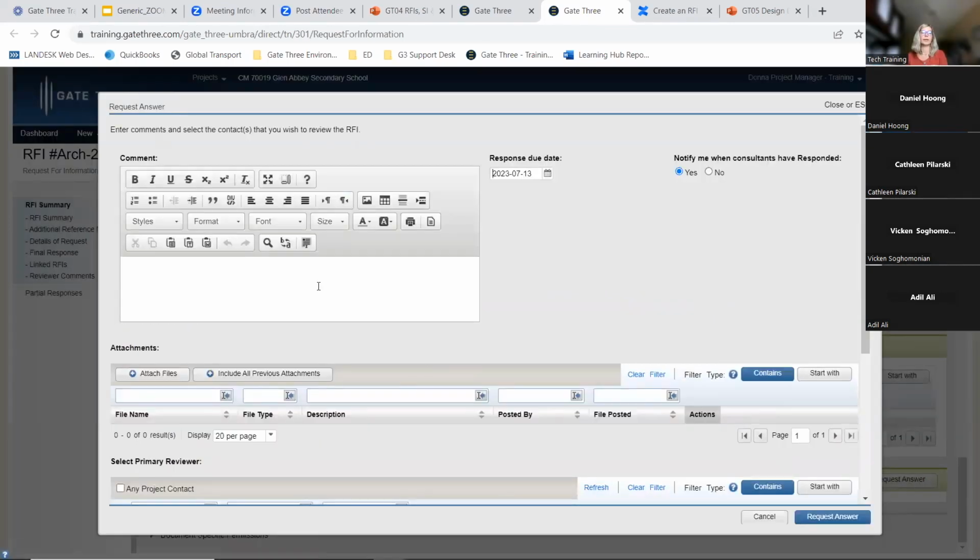Okay, so, all right. So I'm going to put here, Tom is the architect, but I'm going to select something here just to add something. Response due date. So again, this is based on what was configured in the settings for the priority dates, right? So I had high, medium, low, and for the high priority, I had 2 days for the response due date. Today is the 11th. And this is why this is set to the 13th. Okay, so the response due date is July 13th.